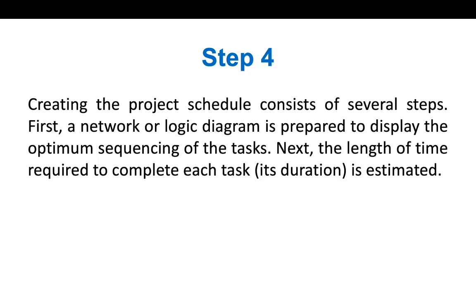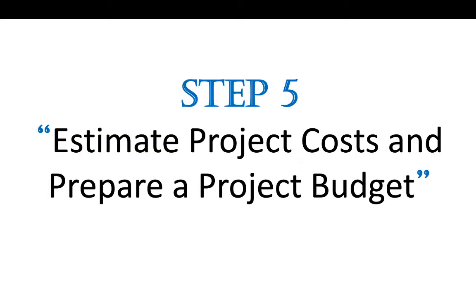So they said that okay, in first 20 days we will buy that land. In the next 15 days we will do some construction work there. Then the next 10 days we will do some type of basement work. So these are step by step how they will do their task. In step 3 they said that what task we have to do, and in step 4 they will do how and at what time duration we will do this. So they will estimate all these things in step 4.